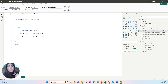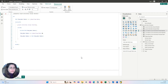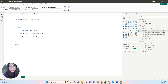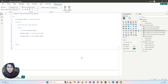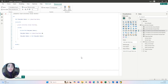This is important because it will prevent our S-curve from having the actual started line extending beyond as a flat line. I will show you shortly what that means. These DAX measures use an IF function to first check if the maximum date in the current context is our reporting date, and if it is, the measure calculates the cumulative totals using CALCULATE and FILTER. I explain step by step what the measure is doing in my articles.